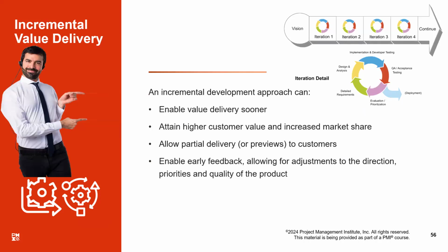I agree that in a predictive project where you have got phases, after every phase you may be delivering something to the customer, but that increment is too big. Maybe your phase itself is 6 months long. That is too big a time. When we say incremental development approach, that means this is small enough, like a couple of days or weeks, and the time is fixed for that. And after every increment or iteration, you deliver something to the customer.